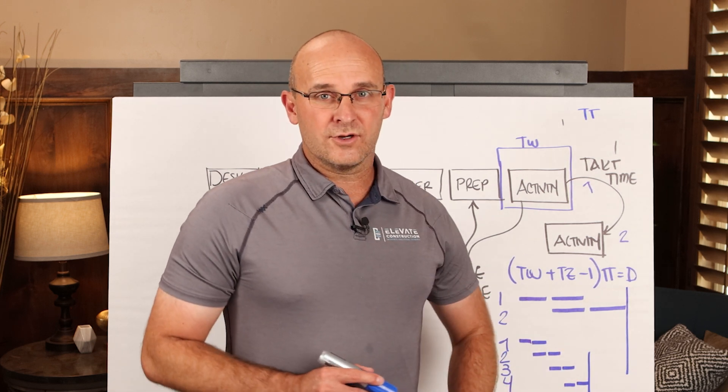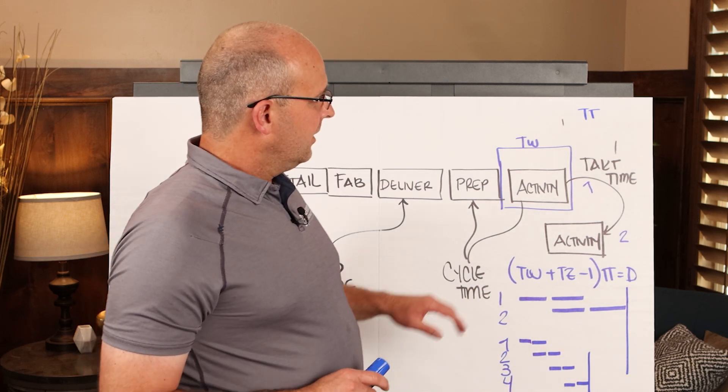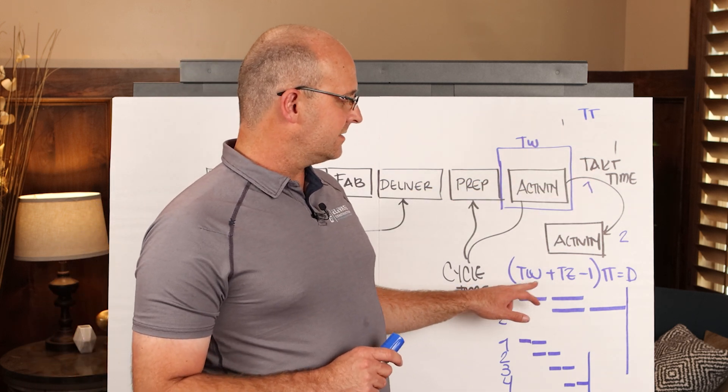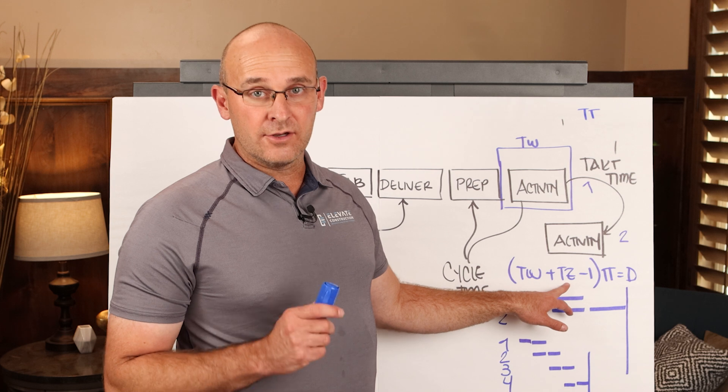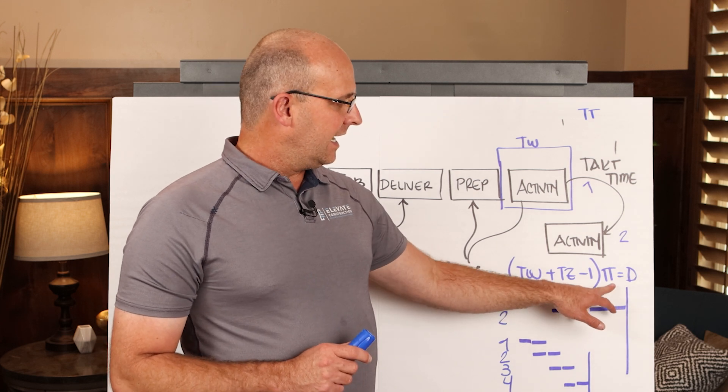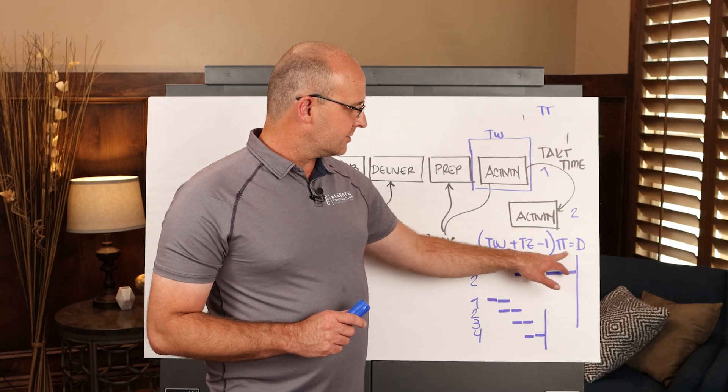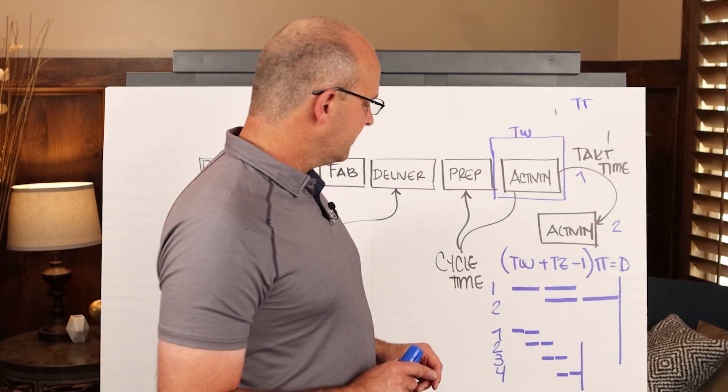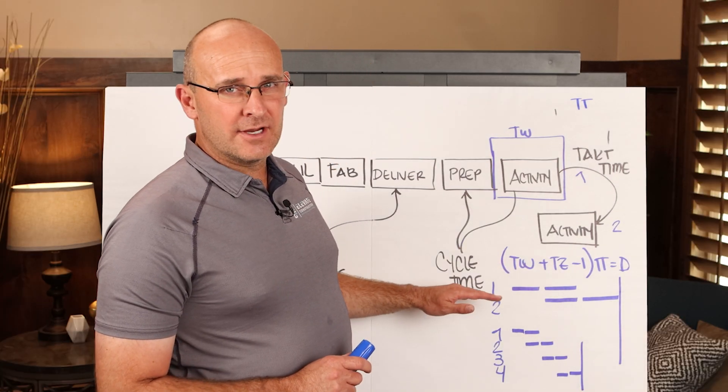So in construction, from a builder standpoint, the reason that you need to understand tack time is because when you package it into wagons, and you identify the number of zones you have, and you proportionally adjust your zones and your tack time together, you get a shorter duration. From a builder standpoint, this is the same area, same amount of work, same people,